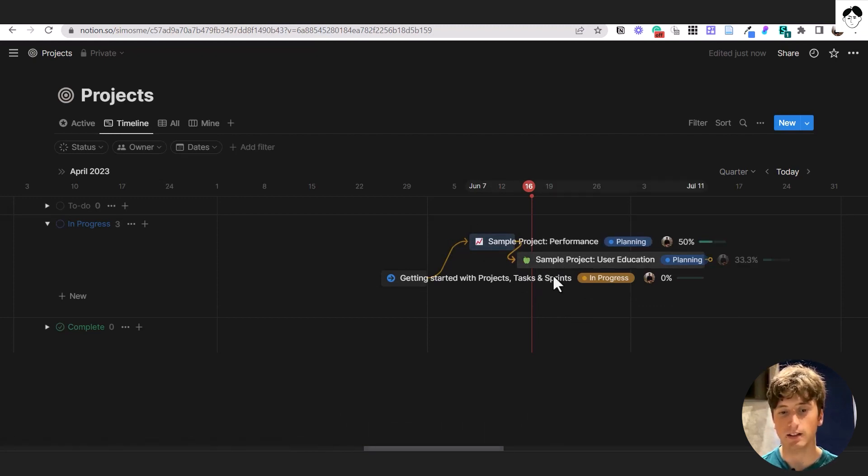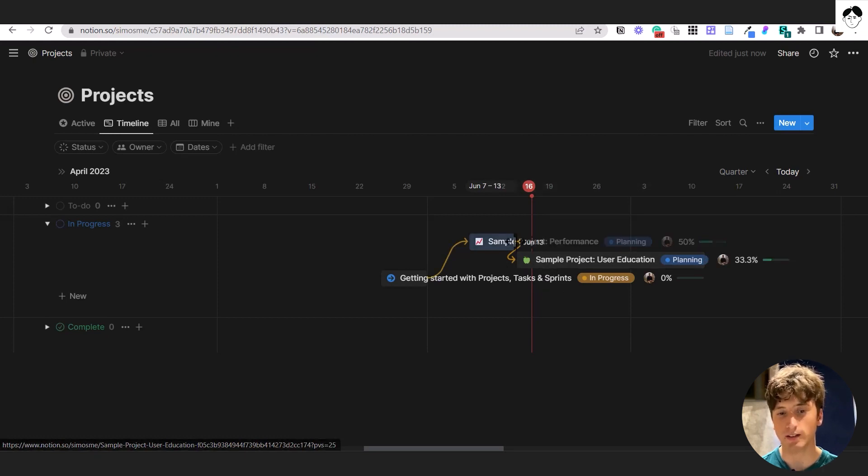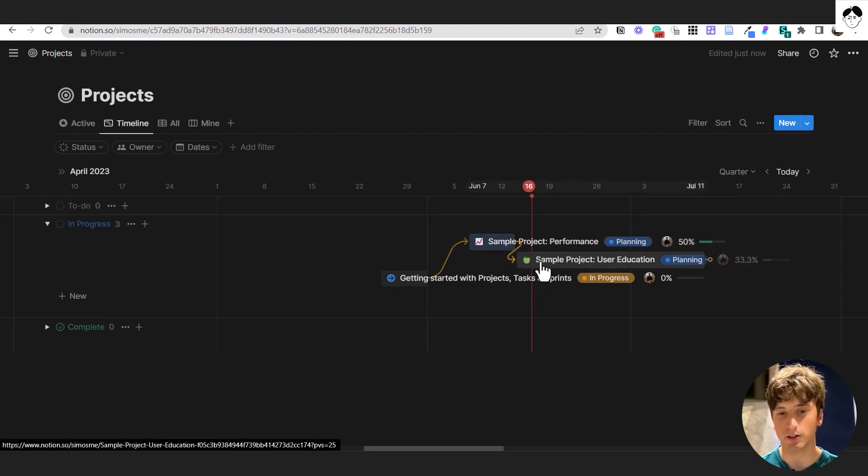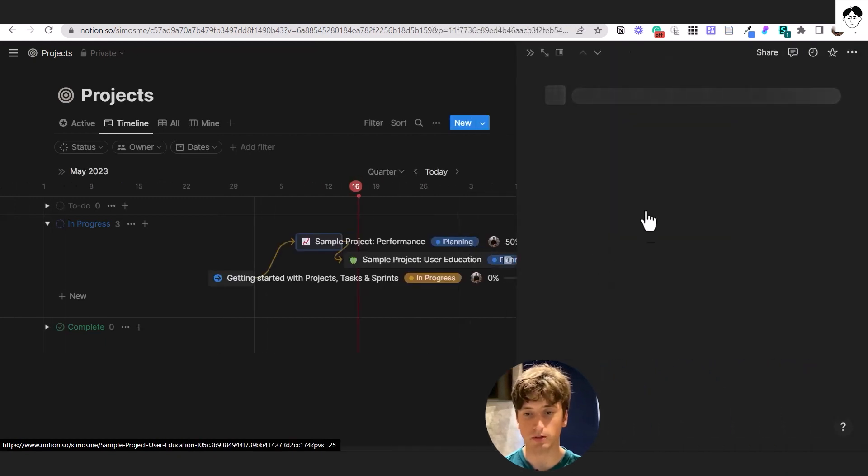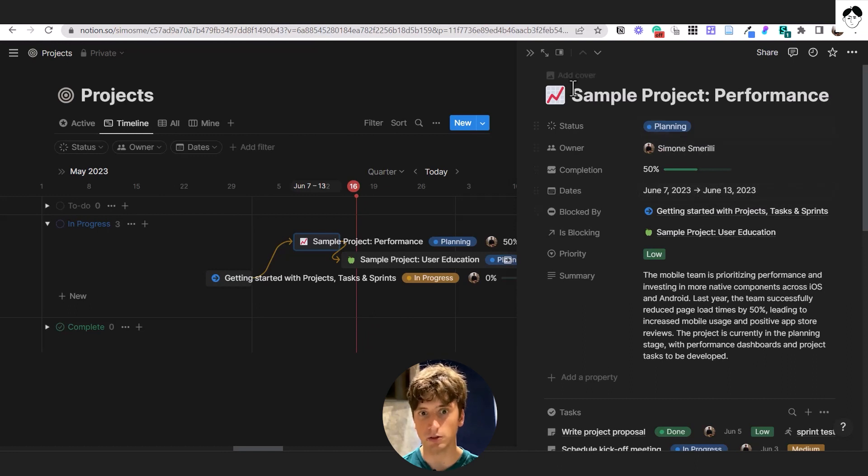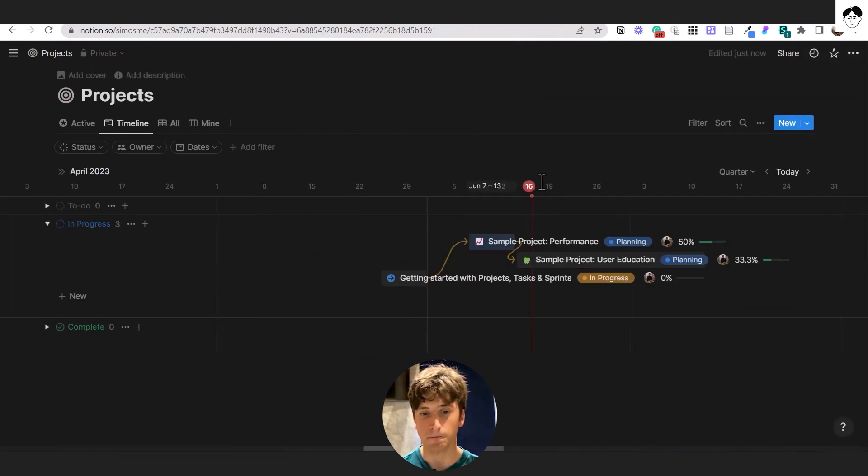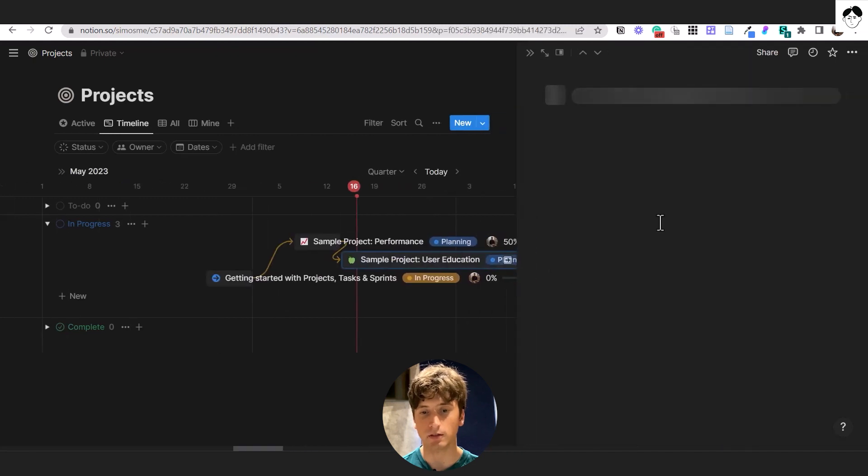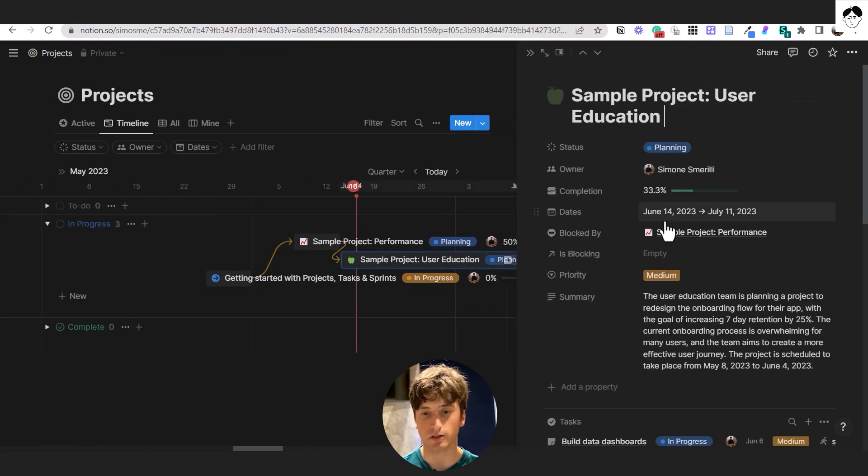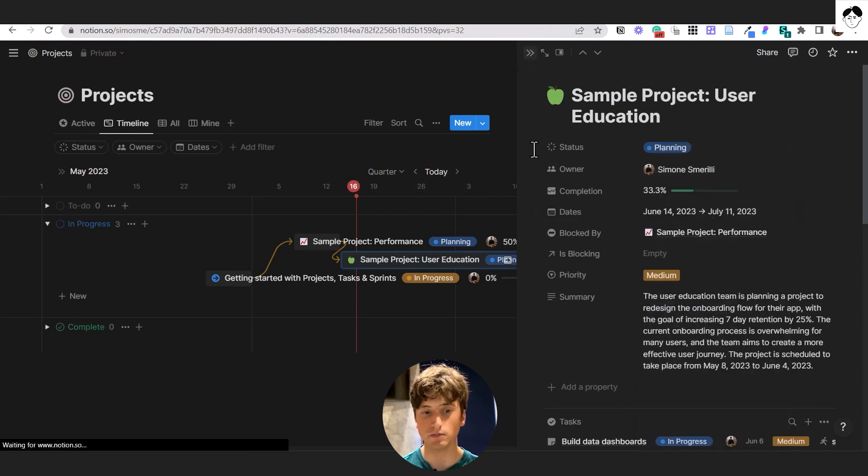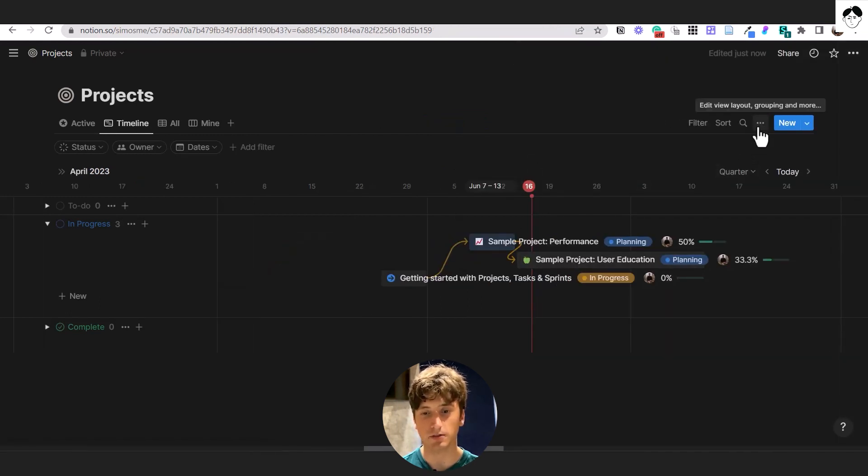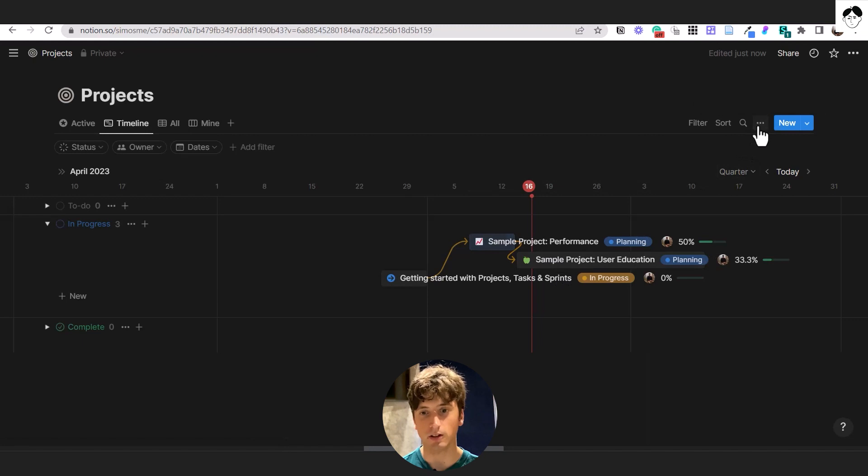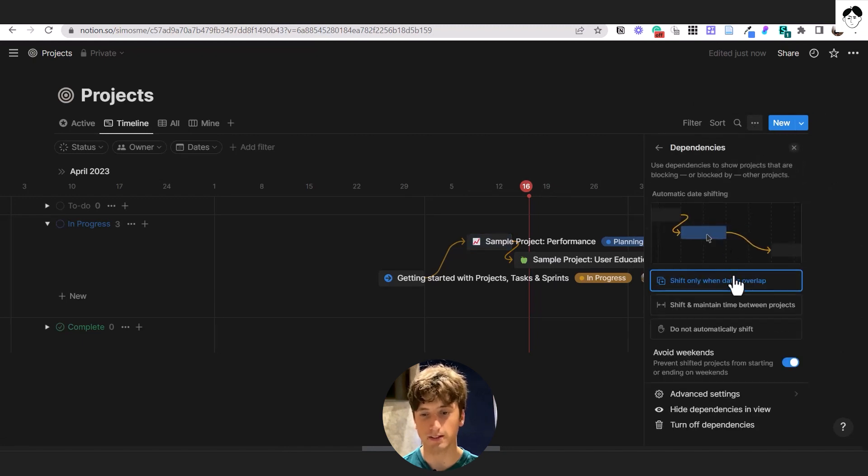And the next project, or the dependent project, will start right the day after at the end of this one, not counting weekends. So you can see if we open product performance, the end date of this product is June 13th with the new shifting date that I did. And the beginning of sample project is June 14th. That is a Wednesday. And that's how the date shifting behavior of the first option of dependencies works.